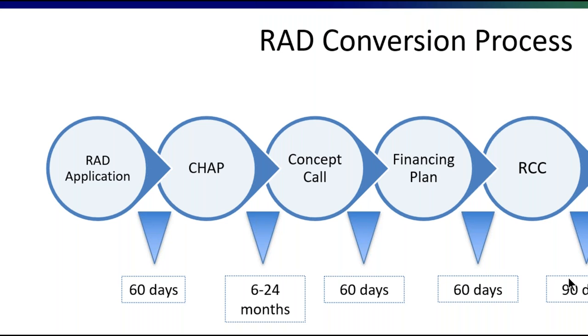And then any rehab or construction ensues. And that could be just a few months, it could be minor, it could be more significant, it could be demolition, new construction. And so here, up to 24 months. So that's a high level overview of our overall conversion process. And hopefully this is an image you can come back to or think about as you think about your engagement in the property and the new owner.